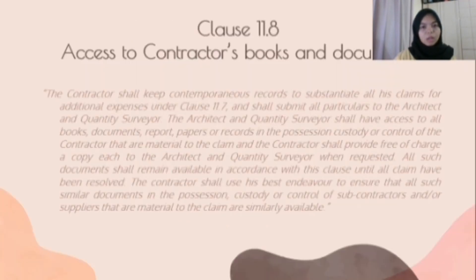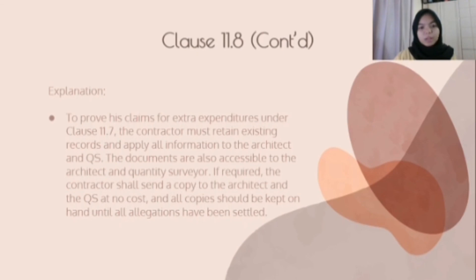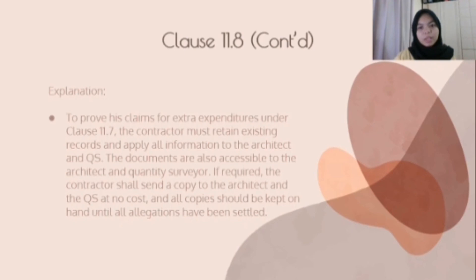Clause 11.8A - Access to Contractor's Books and Documents. To prove his claim for extra expenditure under Clause 11.7, the contractor must retain existing records and provide all information to the Architect and QS. The requirements are also accessible to the Architect and QS. If required, the contractor should send a copy to the Architect and QS free of charge, and all copies should be kept on hand until all claims have been settled.